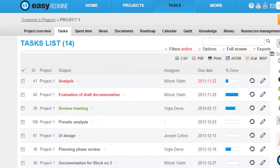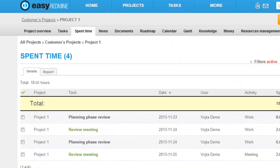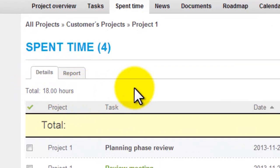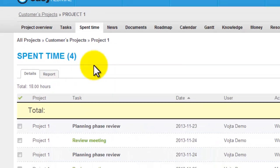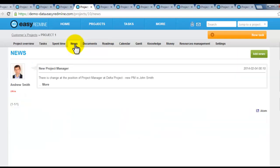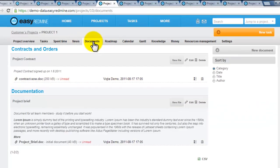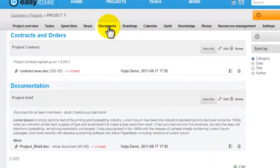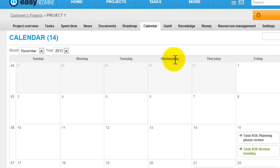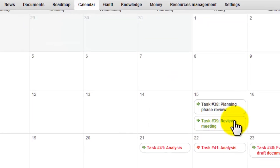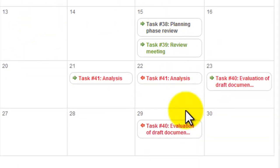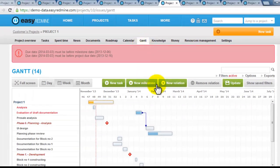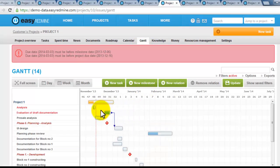Third menu item is spent time, where you can monitor and log spent time on the project. Afterwards you can have project news, you can have project documentation, or you can monitor project tasks by milestones. Project tasks can be displayed in calendar or in a Gantt chart for exact planning.